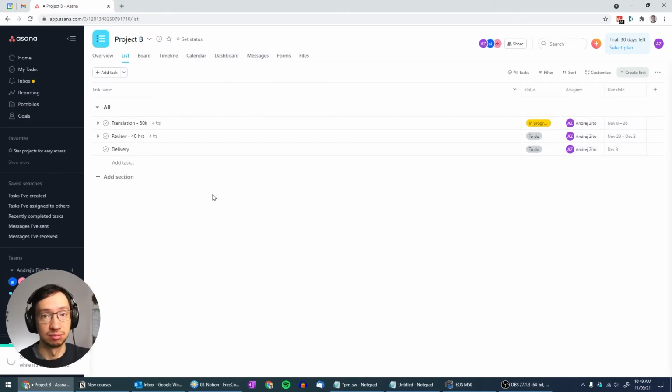Let me quickly give you a breakdown of what we do for project B. So project B consists of the same 4 languages, German, French, Japanese, Korean. But the difference is that we do a few more tasks for German and Japanese, and a little bit fewer tasks for French and Korean. So ideally, I want to split these different tasks and group them for these different, let's say, language sets. For German, Japanese, let's say those would be the priority languages, and then we have French and Korean, let's say tier 2. So this is where we're going to utilize the sections.